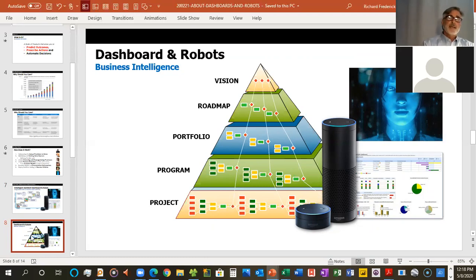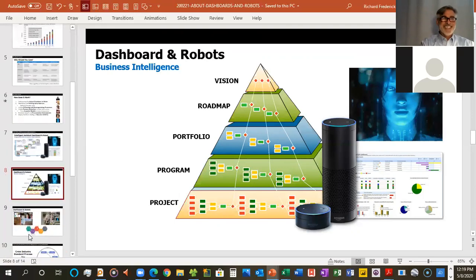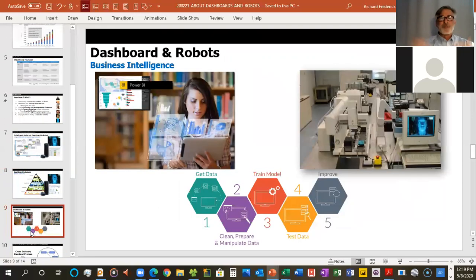The theory is that the data decomposes down to the project level as a plan, and then the actuals roll up, and the difference is known as variance analysis, which then drives our dashboards. This is again assuming that all the data is correct, and more importantly, that it's all clean. Which anybody that's in this knows it's usually neither of those. But we're giving you the vision.